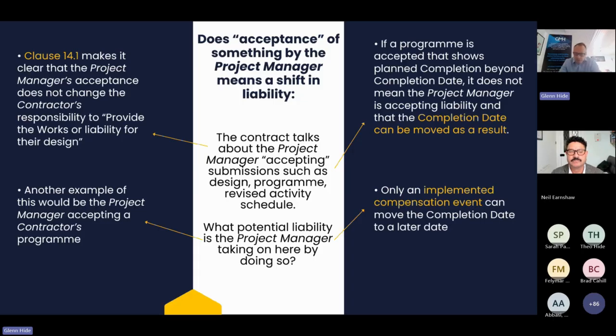Now, a lot of contractors tell me, well, that's rubbish. That's pointless. Acceptance is meaningless. Well, you just have to understand that it's the opportunity for the project manager to see if they want something different or they can spot an error. It's not their obligation to check it with a fine-tooth comb and make sure that the contractor's fully complied. And if it did mean that, you wouldn't get project managers wanting to accept anything. That would be quite problematic. It would encourage wrong behaviours.